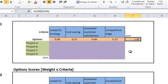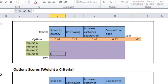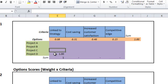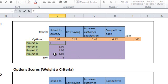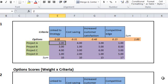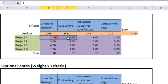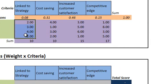This means that I'm pasting the result while performing a division operation. The weights are now based on one point and must sum up to one. Now we'll apply the same approach to rate projects from A to D against each criterion. Let's assume that project D is the least one linked to strategy, so I'll assign one to it. Project C is four times more probable than D as linkage to strategy, so I'll assign four to it, then project B is three, and finally project A is two times.